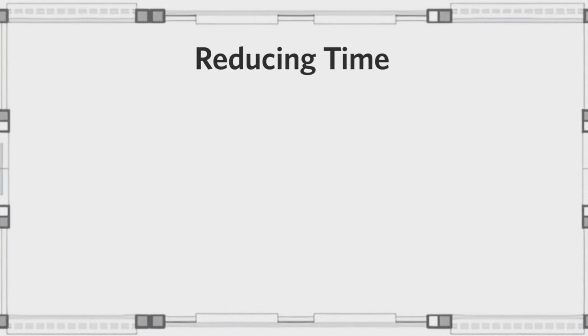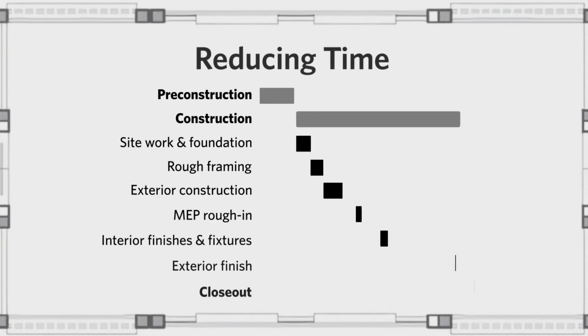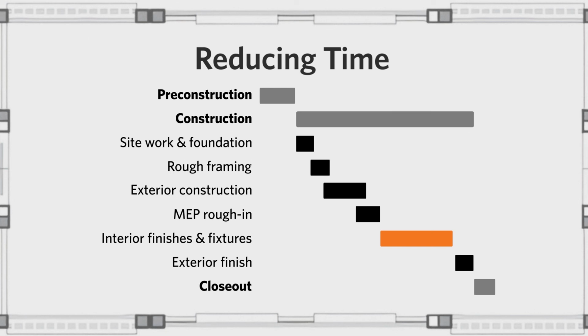First, reducing time. Within a standard installation schedule, wall protection installation usually needs a proportionally large block of time in the schedule in order for the stock length material to be measured, fabricated, and assembled on site. With WallProtect's Prefab, the prefabricated products are able to be installed in a third of the time usually required. This allows the installers to come in after the final paint, flooring, and ceiling are all complete. And this also eliminates rework, inefficient subcontractor crossover, damages, and delays.